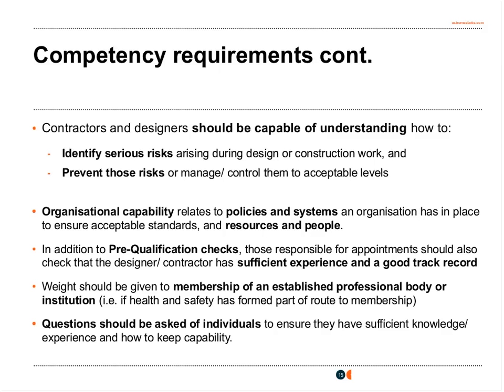The main takeaway point here, I think, is that when making appointments as a CDM client, and this is probably equally going to apply when you are employing others, you need to determine those competency criteria yourself. You then need to assess against it, and this is probably something that your procurement teams will need to be considering, possibly in relation to questions in pre-qualification questionnaires and as part of the tender process.